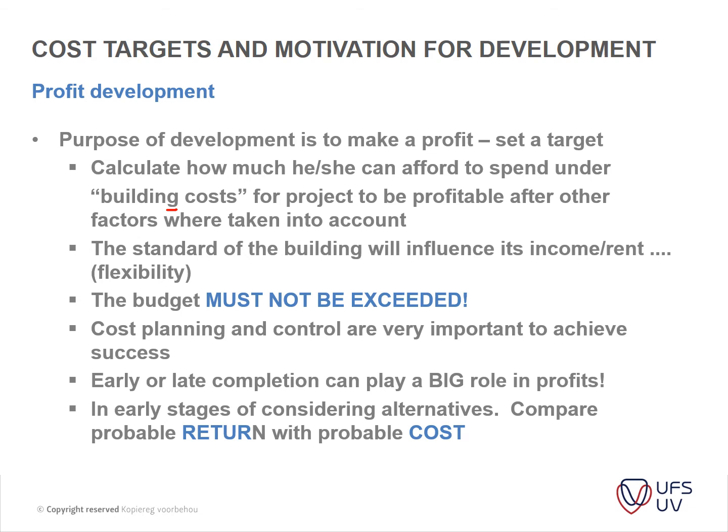So whenever you start with a development, a developer will have to look at the cost of land, the design cost, if VAT is added to that, if services have to be paid, the upkeep of those buildings, etc. The standard of the building will influence its income, rent and flexibility.